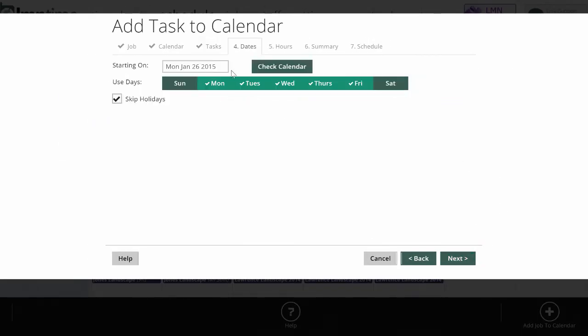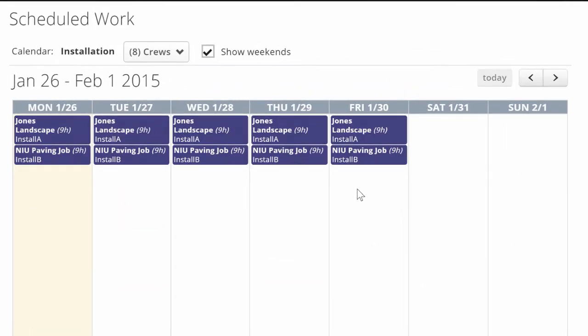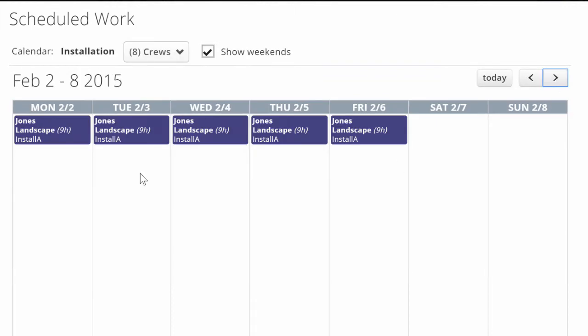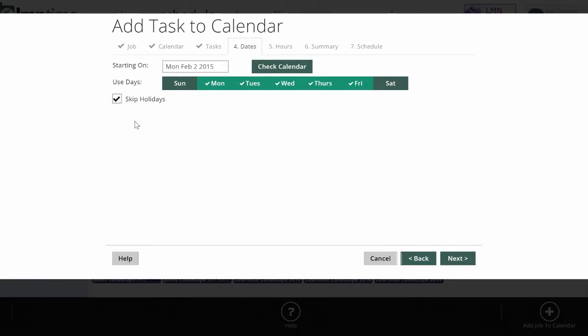Next, I want to pick when I'm going to schedule this job for. I can pick a specific date or I can check my calendar. Here it shows me my two installation crews are booked up this week because I've got install A and install B crews. Next week, however, I can see I've got a gap for install B, so I'll add it to that Monday by just clicking on it.